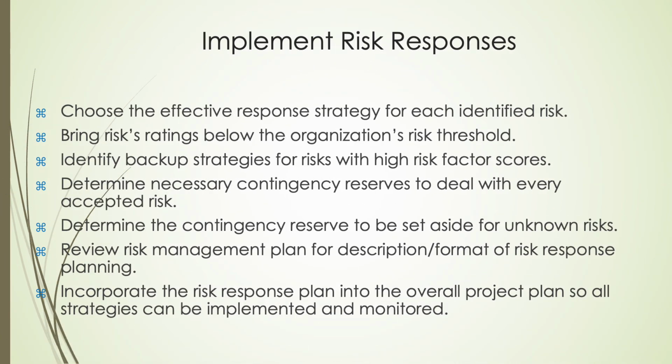Effective risk management begins with identifying, analyzing, and prioritizing risks based on their potential impact and probability, enabling project teams to allocate resources effectively and assign targeted responses. Each identified risk is then addressed with a specific risk strategy: avoiding the risk entirely, transferring it to a third party, mitigating its impact through proactive measures, or accepting it when it falls within tolerable thresholds. Through structured tracking, mitigation planning, and resource alignment, risks are systematically managed to maintain project stability and progress.